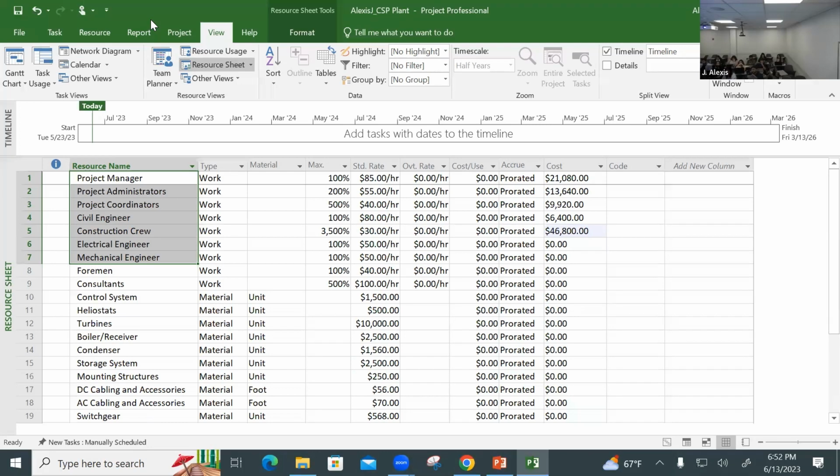So that's an example of where you have an over-allocation. Then you could say, well, instead of 8 hours on those activities the same day, why don't you work 4 here and 4 there? Right? You can do that, and I'm going to show you how to do it.